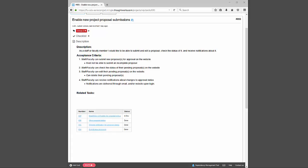When developing this story I needed to think about exactly what my acceptance criteria would be and what are some outlying cases I would need to account for — such as: staff and faculty must not be able to submit an incomplete proposal, they must be able to delete their proposals, and they must be able to receive notifications, be it through a website or through email.